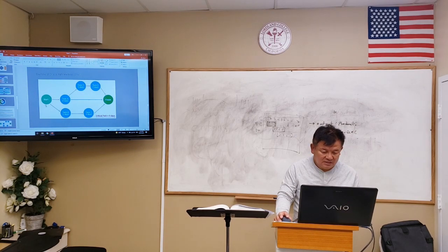How do we do that? Starting here, task A takes 3 days. Task D, 3 days. Task E, 3 days. Task B, only 2 days. Task C, 4 days. And then finish. What is the critical path days? First, start, task A 3 days, task D, task E, finish. This is the critical path.